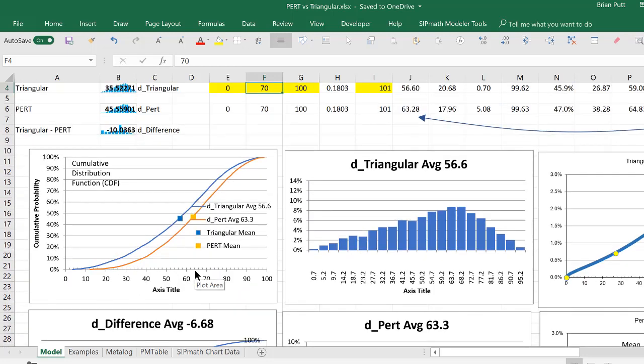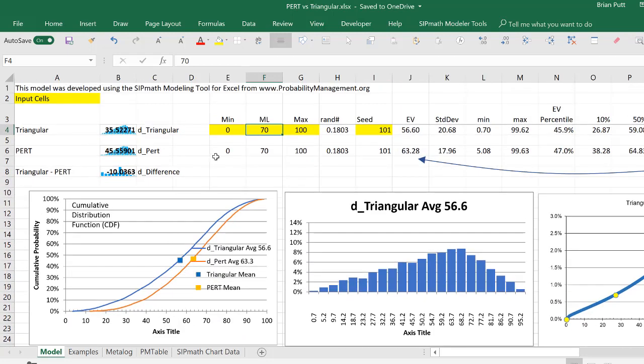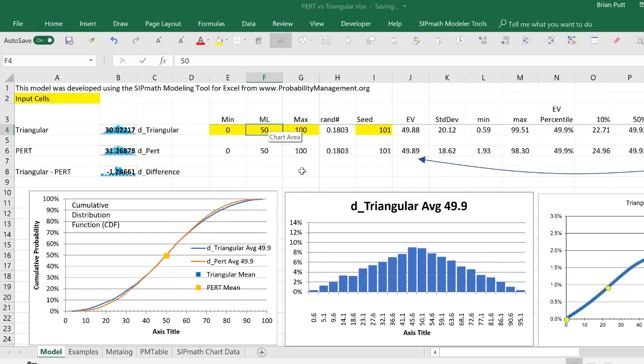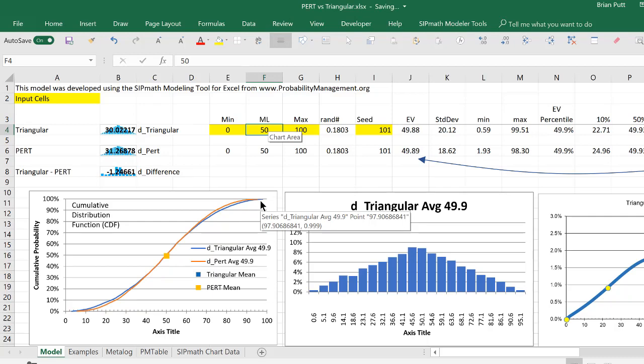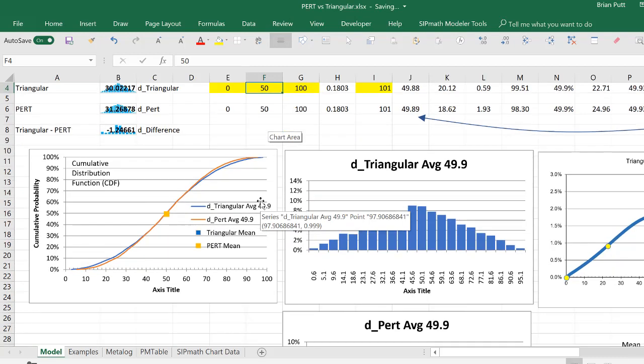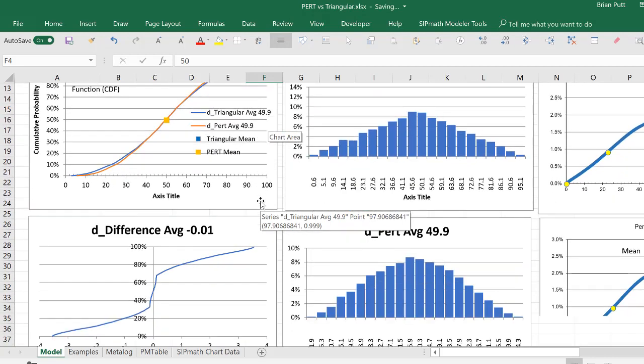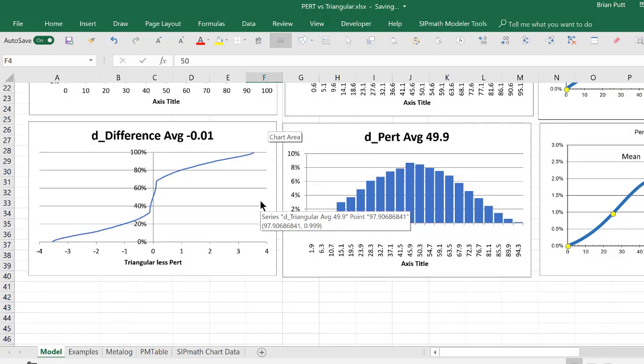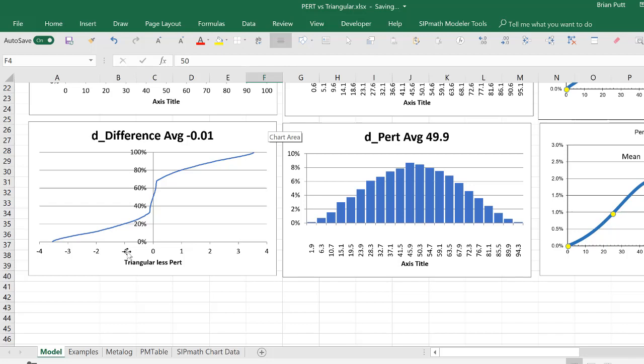And now, let me make it a symmetrical distribution and put in a 50. And what we find is they're almost identical.